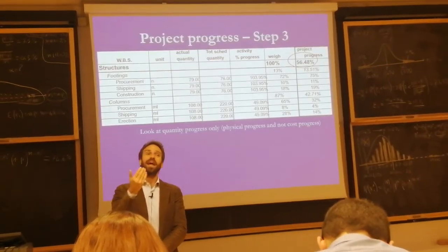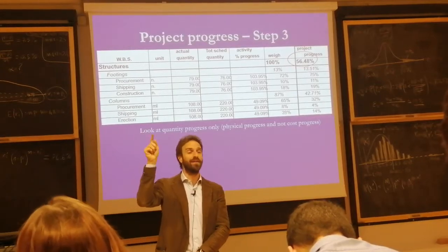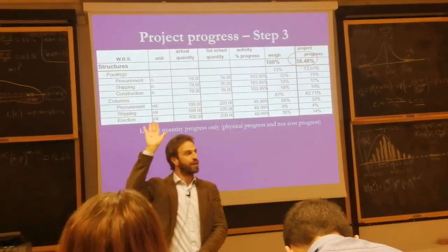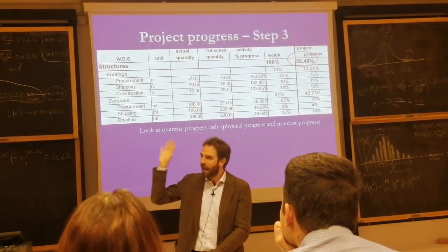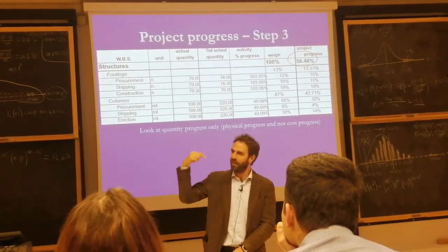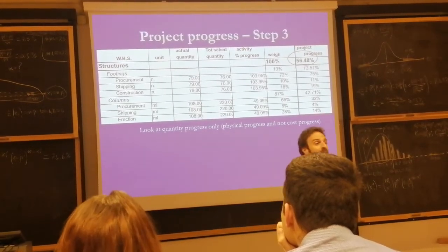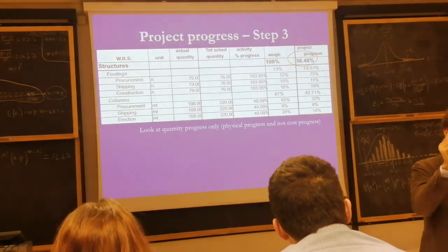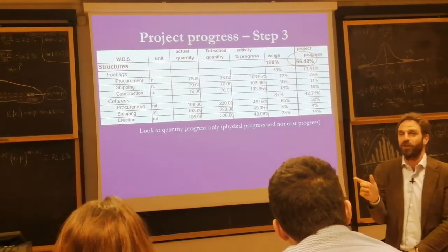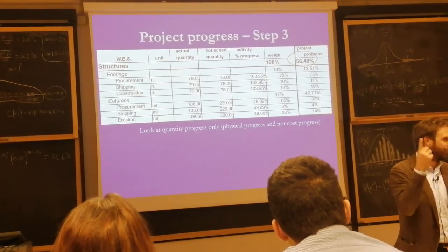Just to let you know, if the 3 extra units were requested by the client at a later stage, we should have placed a change request and said, "No problem, I can do the 3 extra for you, but please pay for them separately, because it's not part of my progress. And please also give me some extra time, a few more days, to install them because I need longer." But now it's my mistake as a contractor, it's not my client's mistake.